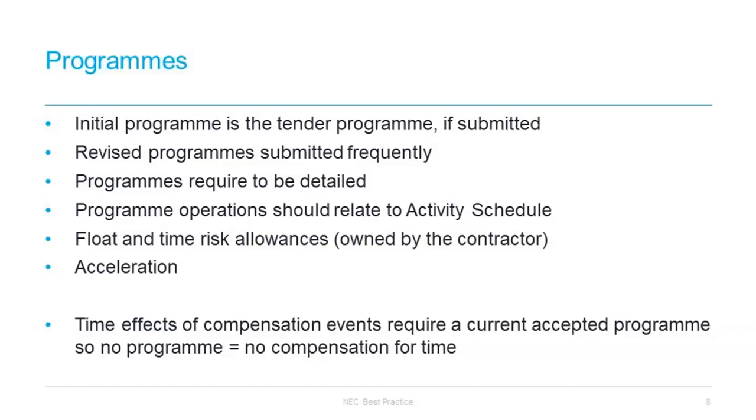This is an obvious point, but sometimes the focus on programmes can be on your own activities without considering other influences on your work. So the fact that the accepted programme shows the float and time risk allowances is really quite interesting under NEC, because the delay and impact of compensation events is measured by reference to planned key dates and planned completion dates shown on the accepted programme. This is distinct from some other forms of standard form contract and means that the contractor owns critical path float, what we refer to as time risk allowances.